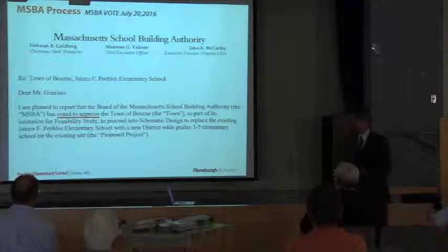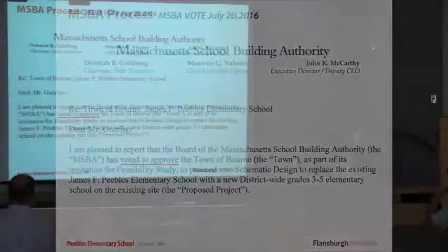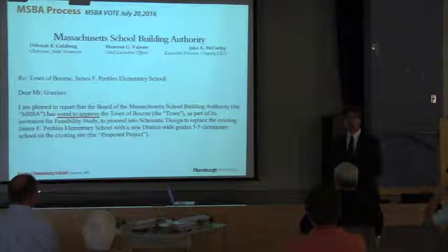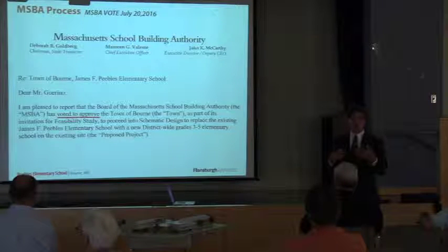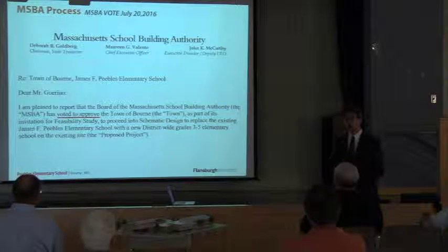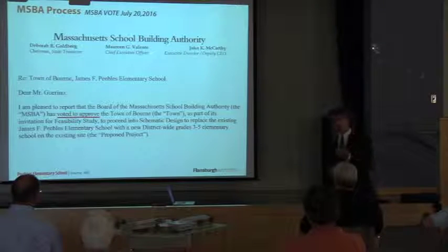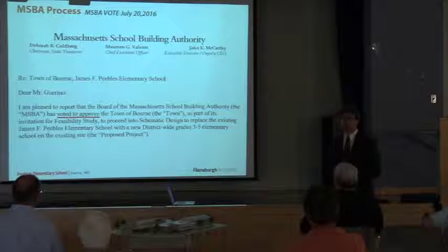Just recently, July 20th, the MSBA Board of Directors approved the preliminary schematic report for this project. That is a very, very significant vote of approval. That is saying to you, the town, that the MSBA Board of Directors agrees with the design that's been submitted, the option 5A, and is approving the town to go into the next level of design, that is the schematic design phase, which we'll talk about tonight where we are with that. So it's a very, very significant, very important milestone for the town, which gets us closer to realizing that very significant grant from the state.